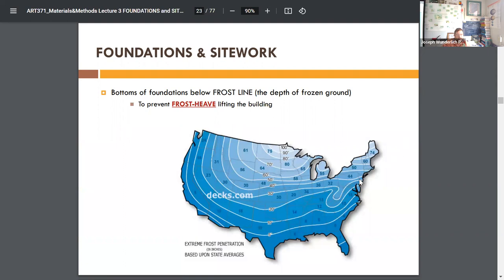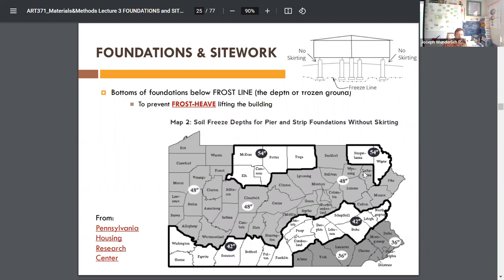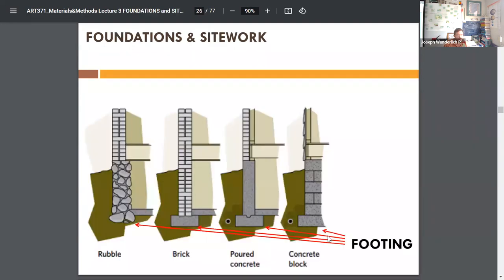Here you can see the frost line depth map. We're in Pennsylvania. Down in Texas and California, the frost depth is insignificant — maybe five inches — and you're going down that far anyway just to distribute the load. It varies by foundation type: skirting piers or spread footings, but more or less 30 to 36 inches here. I'm down 38 inches on my project — plenty to code.